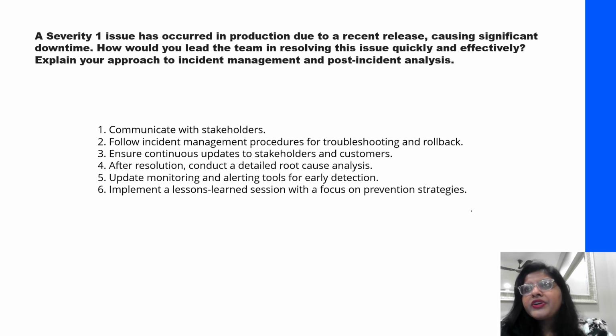The next thing we did was include those alerts, for which the dashboards were not set up. So we set them up for early detection going forward. When getting those alerts, we could action more promptly. This was more like a post-mortem rather than a precaution. So this is what we implemented for future releases. And the lessons learned and the prevention strategies were shared with the wider audience.